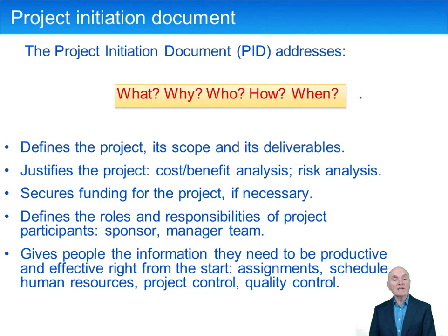And it's a project initiation document where much of this planning work is actually held and recorded. Think of it as a handbook of the project. It sets out what the project is going to be, why we're doing it, who's involved in it, how we're going to do it, by when it has to be accomplished, all the important questions. And very importantly, at the start, it defines the project scope and its deliverables.